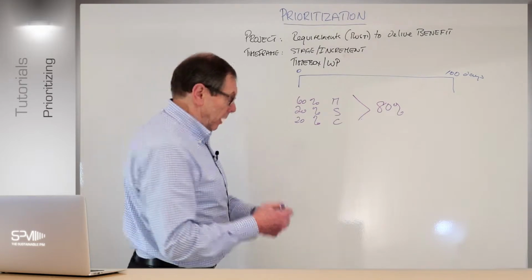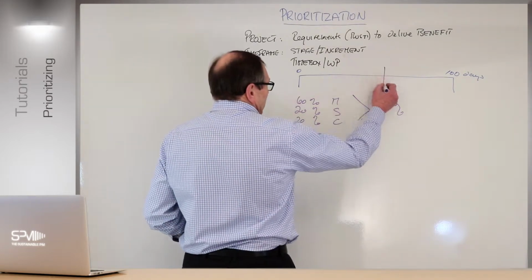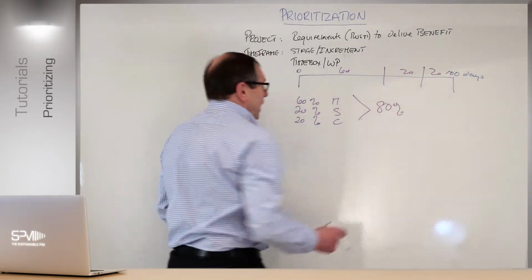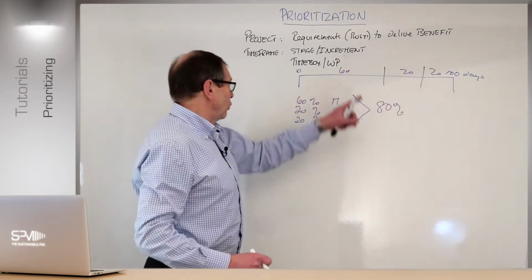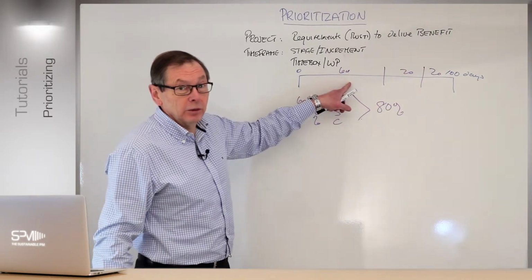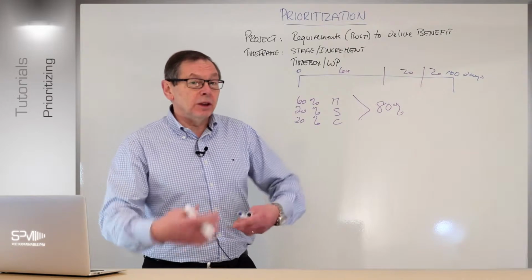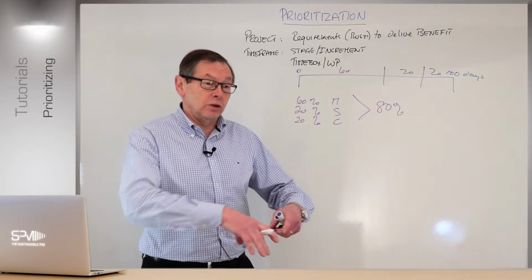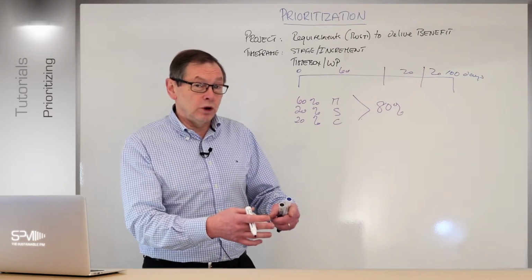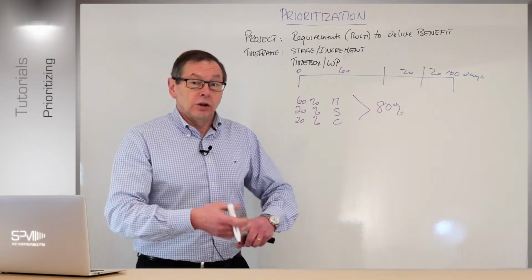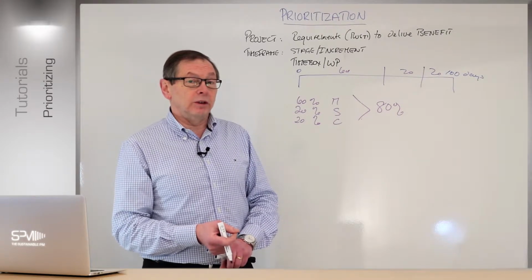What that does not mean, by the way, is that I'm doing 60% here and 20-20 here, in that, from a time frame point of view, I'm doing all my musts here, my minimum requirements here, the shoulds and then the coulds that way around. You obviously divvy them up, because from a project perspective, we want to group them from a point of view of dependencies and those relevant to that particular solution we're trying to get out at any one point in time.